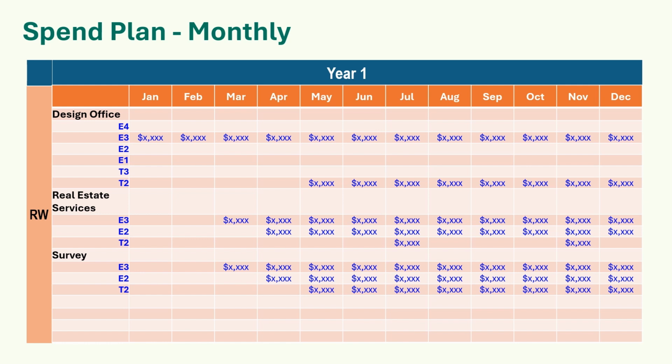Prepare a cost estimate for construction using one or more of WSDOT's cost estimating methods. See the cost estimating topics on the WSDOT Project Management Guide website for assistance on this. The construction estimate includes WSDOT's contract administration, office engineering, management, inspection, compliance monitoring, closeout, and nearly everything in the construction phase, including the contractor's payments. It also includes below-the-line costs and taxes. Before you hire consultants, you must know what deliverables you will need from them and what amount of budget you have for their services. See the scoping topics on the WSDOT Project Management Guide website for assistance on this.